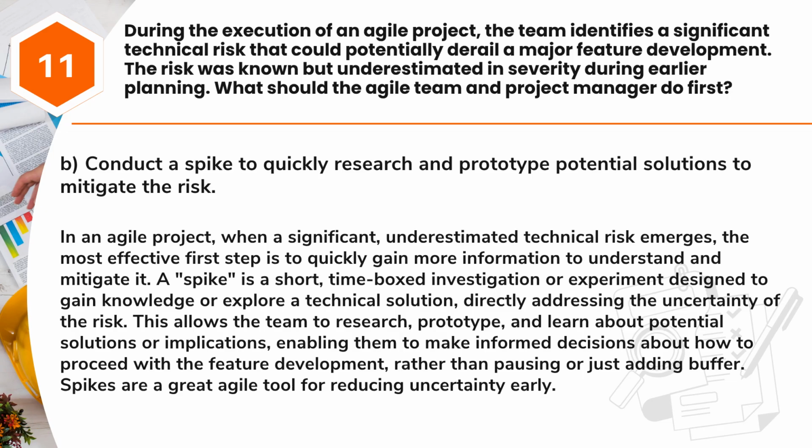This allows the team to research, prototype, and learn about potential solutions or implications, enabling them to make informed decisions about how to proceed with the feature development, rather than pausing or just adding buffer. Spikes are a great Agile tool for reducing uncertainty early.